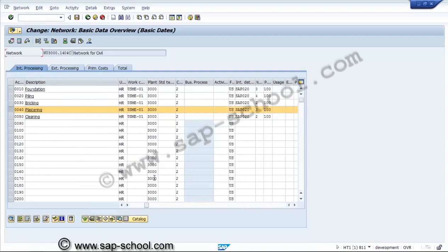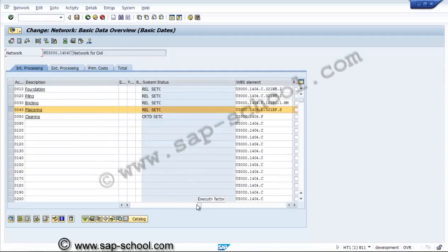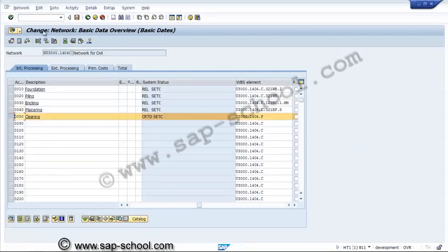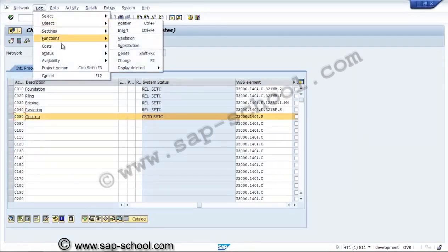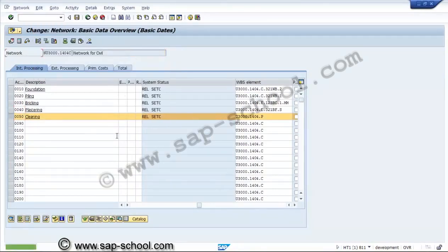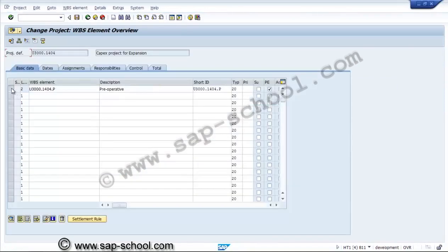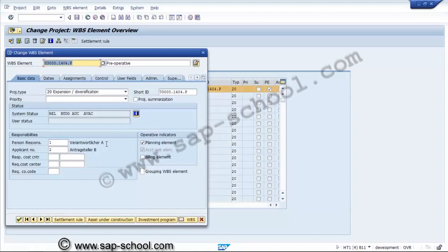And similarly we'll check that the status of this activity is released. Now for the next activity, this WBS is also released, so we'll release this activity. We can release all activities together, but whatever WBS elements are allocated, those WBS elements should be partially released or released. Now we can see over here, for this WBS element it is released, budgeted, and availability control is activated, and